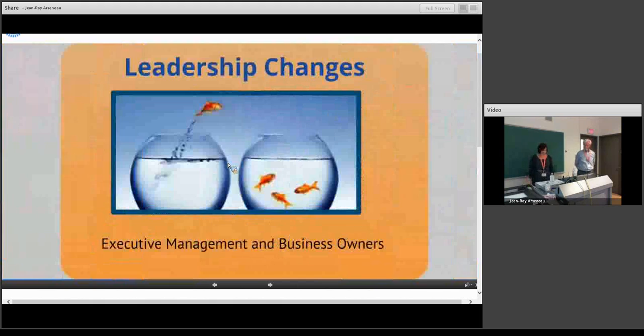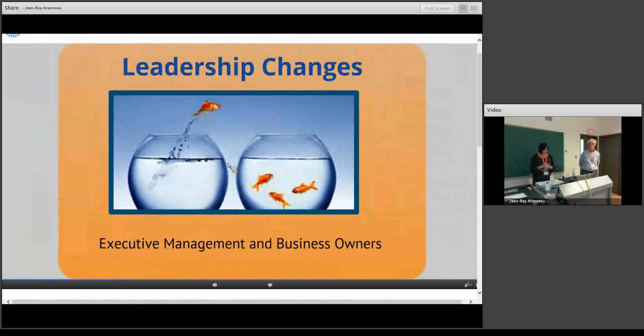Leadership change. So in HR, leadership turnover was one factor that definitely made a strong case for the readiness assessment that we did. We experienced 100% turnover in our senior project sponsors. That really was a challenging time. It directly impacted the project's vision and momentum. There was a risk of the project stalling.